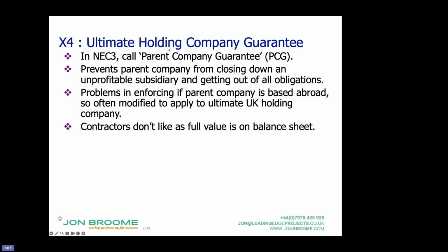Experience suggests that actually you don't want the ultimate holding company guarantee, because if it's a family firm, and I won't mention somewhere I know this is the case, but where all the assets are held in a trust in Bermuda, getting the money off the Bermudan firm is going to be difficult, and by the time you get it, it will be moved to Jersey or wherever, or then Guernsey and so on.